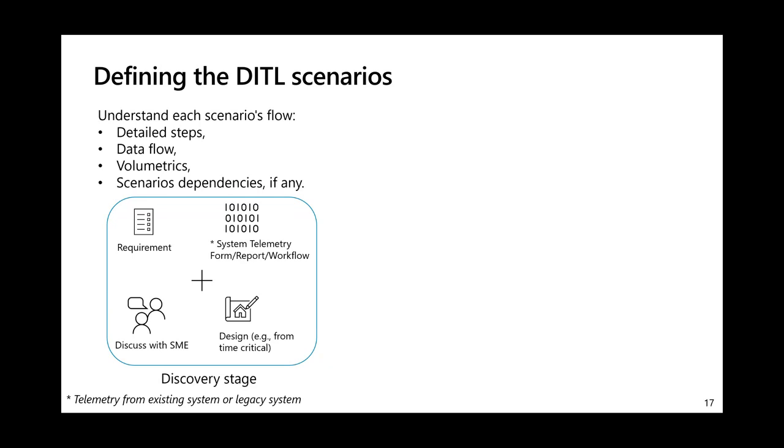Second, chat with the SME or partner or key user together to discuss what is the core process in their real-life daily operation. Sit together to discuss what is the key of the scenario in the day-in-the-life testing, because they should understand their business operation, their business process, and what is their critical business process in the mission critical system in the daily operation. During the discussion, I talked about the goal to make sure everybody is on the same page for the scenario and the goal.